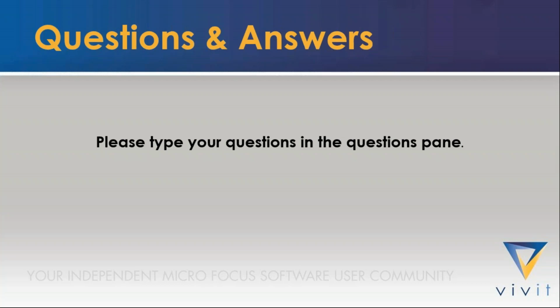Thanks. Another one from Dinesh is, did you guys do any ticket migration from Service Manager? And if so, what were the challenges? Okay, so we did not really bring all the data across from HPSM, and that's the decision that we had made, because all of the data is still accessible to us, and through our reporting environment, we're able to see 13 months worth of data, regardless of which system it's coming from. But we've had to import some of the SOPs that we had in HPSM, pardon me, and other metadata, and I think that also made the process quite smooth for us. Agreed.